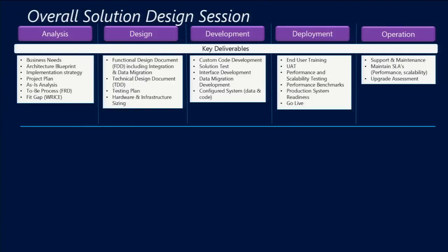We also like to see things such as the hardware and infrastructure sizing. Oftentimes people like to leave that to UAT. However, at this point in time, it's important that we have the usage profile specified within Lifecycle Services, which talks about the volumes. We then actually submit formally the hardware and sizing infrastructure document to the customer, so we're not left with any surprises.